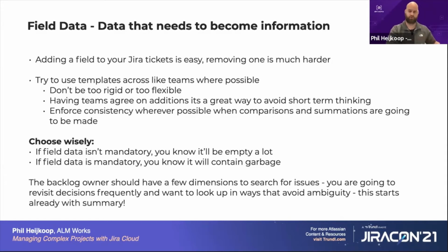So the person who is constantly referring and grooming, tracking in and out of this particular backlog should be able to find these things. And so it's important that this person also understands the dynamics of Jira, the dynamics of the work coming in, how it's coming in. And there needs to be consistency, because Jira search is, well, JQL is great, but searching by text is kind of tricky. And so that already means, hey, there should be a rule in how we write the summaries, a rule for how we fill in all these different things so that I can look along multiple dimensions to find this information.